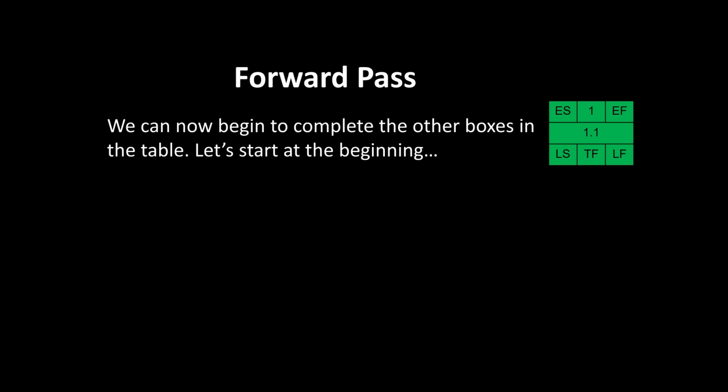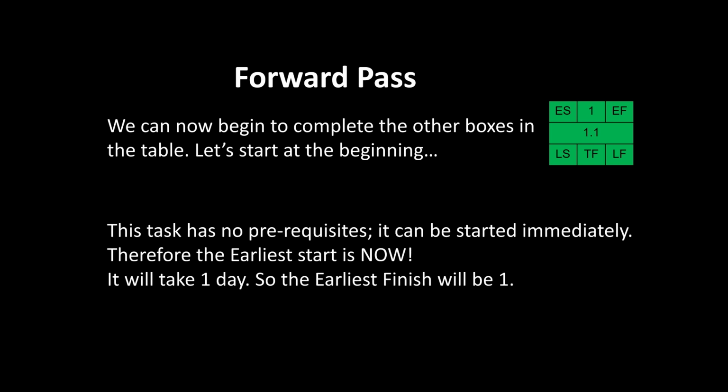Now this is a green box. So we decided that green boxes didn't have a dependent, they didn't have anything they were reliant on. They were not dependent on anything else. So when is the earliest they could possibly start? No prerequisites, we can start it now. Anytime we like, we can just crack on with this one. So we know our earliest start is going to be 0. We've got to wait 0 time, we can crack on.